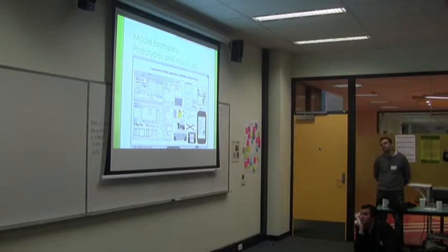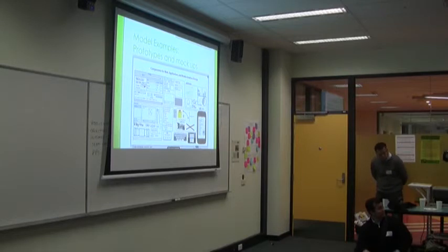I guess it is a problem when you've got iPad apps and stuff. Yeah, you're kind of doing that sort of spiral prototyping. Joel Spolsky has a really good blog post on this. I think he calls it the iceberg problem, being that the UI is like the tip of the iceberg, but most stakeholders don't realise. So he suggests, if you've got 2 features and each of them is reachable via a button on the front page, make one of the buttons look nice and finished, and the other button, if the feature behind it's not finished, for God's sake, make the button look unfinished, and make the text around it look crappy, so people realise that the thing's only half done.